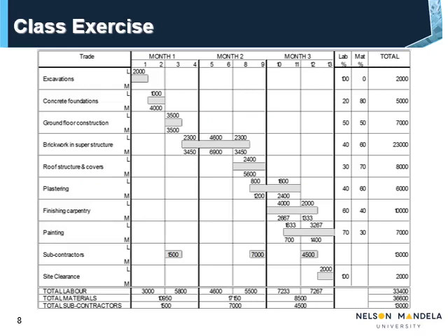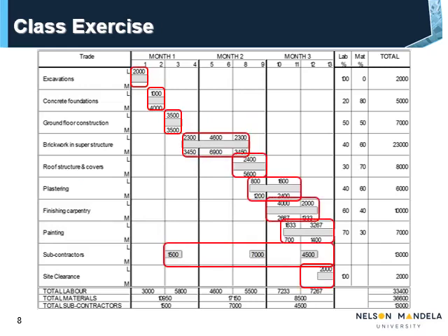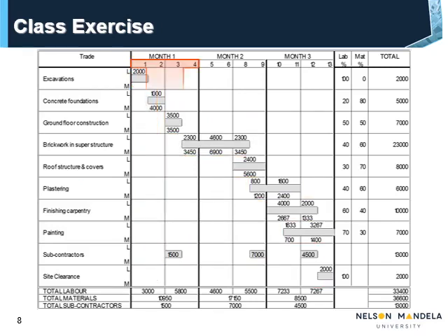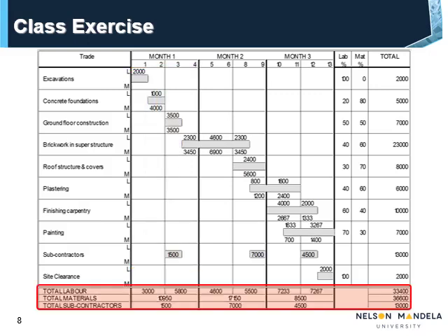On this slide, you can see the bar chart for the project, indicating the budgeted cost allocated for each activity, by period, in this case 2 weeks, and by month, and relative to labor, materials and subcontractors. At the bottom of the bar chart you can observe a table, indicating the total labor, material, and subcontractor costs.